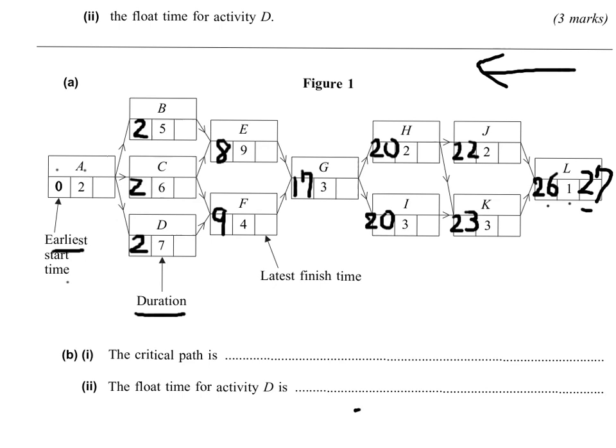Now day 27 is the finish, and it took 1 day to finish, so K's latest finish time is 27 take away 1, which is 26, and here as well, 26.